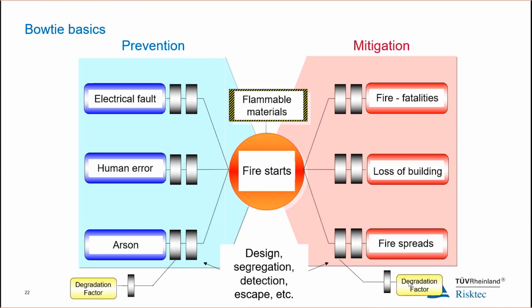But it might be fairly common practice for those entrance doors to be propped open by the residents, so that degrades the effectiveness of that barrier. That introduces a hole into that barrier. Okay, so what barrier do we then have to do to make sure that this does not degrade that, such that our barriers are still working as well as we wanted them to? So we can build up this pictorial representation, have a discussion, communicate it, and build. Again, the better we understand, the better we manage.